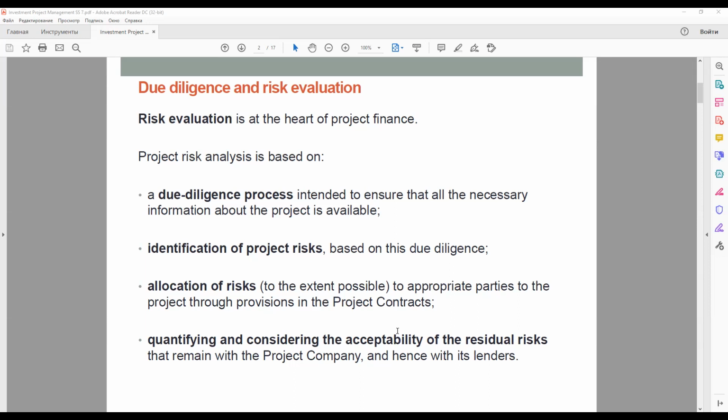So it is not an efficient way to leave this risk for the project company or for the management of these properties or area, etc., or for the construction contractor. The most efficient way is first, probably, to allocate this risk to the local authority, because they have enough power in this region, they have legal expertise, they have professional staff, and they probably will find a solution in such cases when this land rights risk is realized.